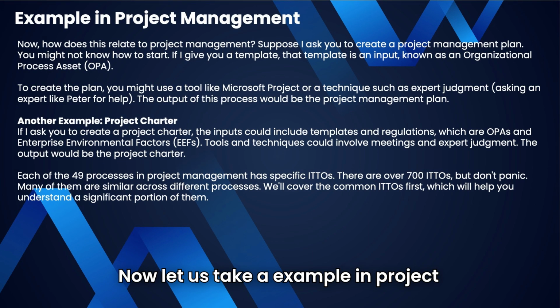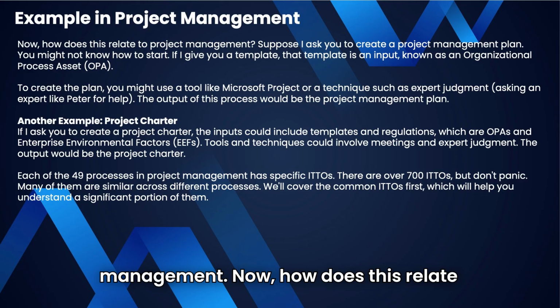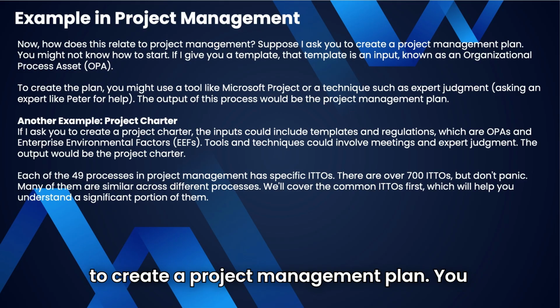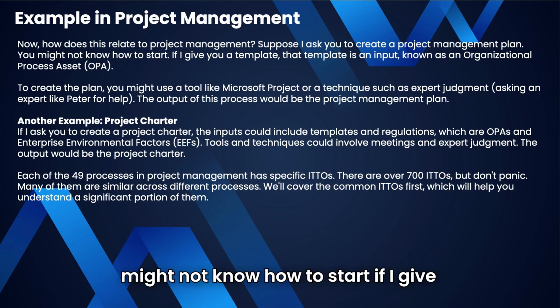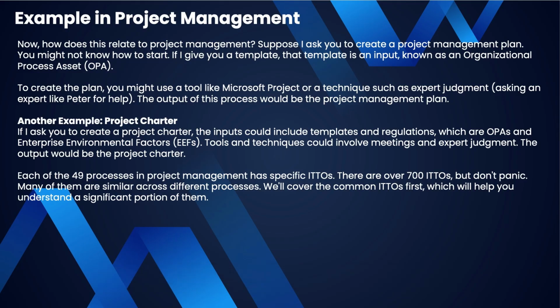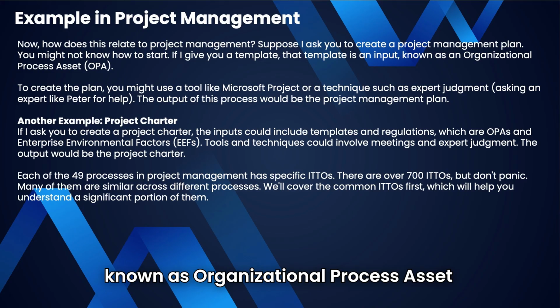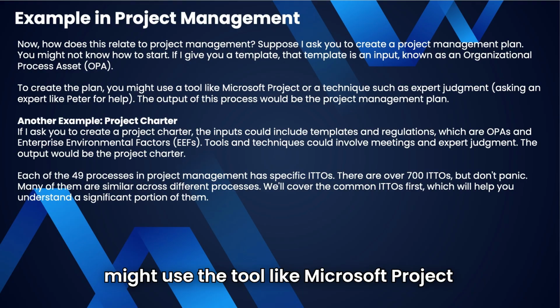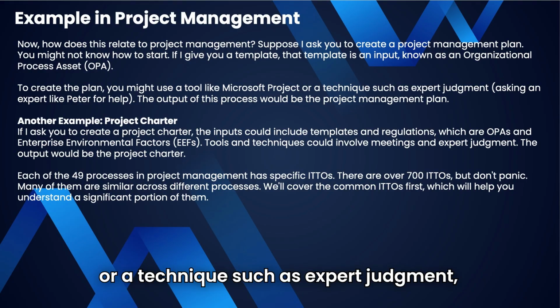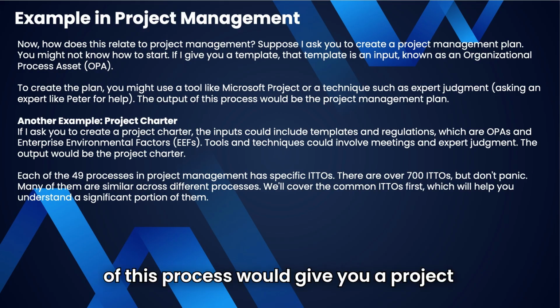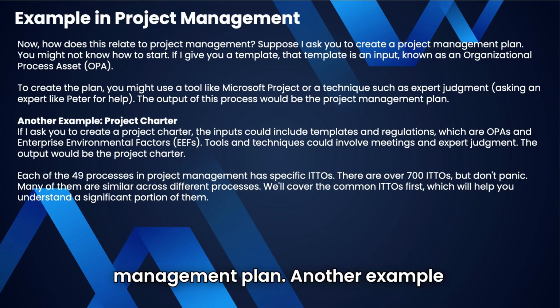Now let us take an example in project management. How does this relate to project management? Suppose I ask you to create a project management plan. You might not know how to start. If I give you a template, the template is an input, known as Organizational Process Asset (OPA). To create a plan, you might use a tool like Microsoft Project or a technique such as expert judgment, asking an expert like Tom for help. The output of this process would give you a project management plan.